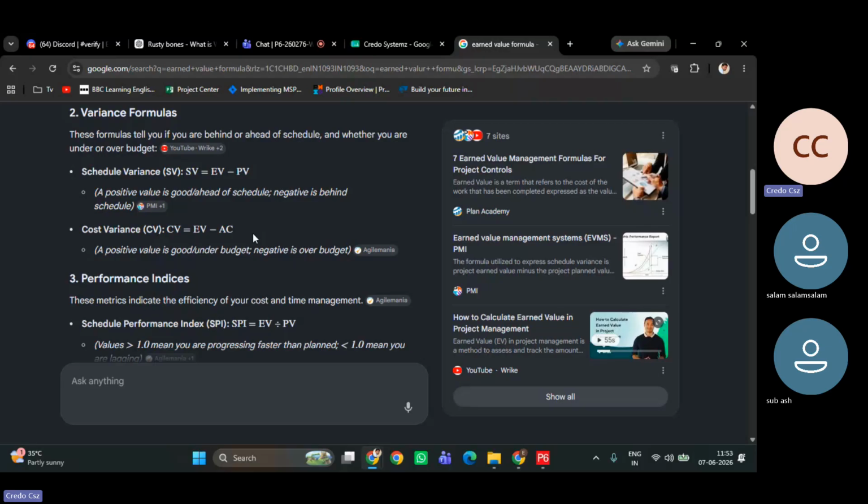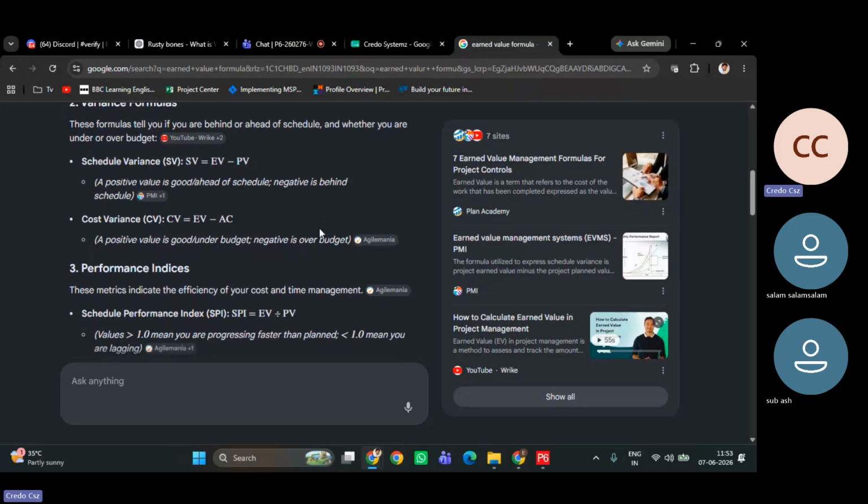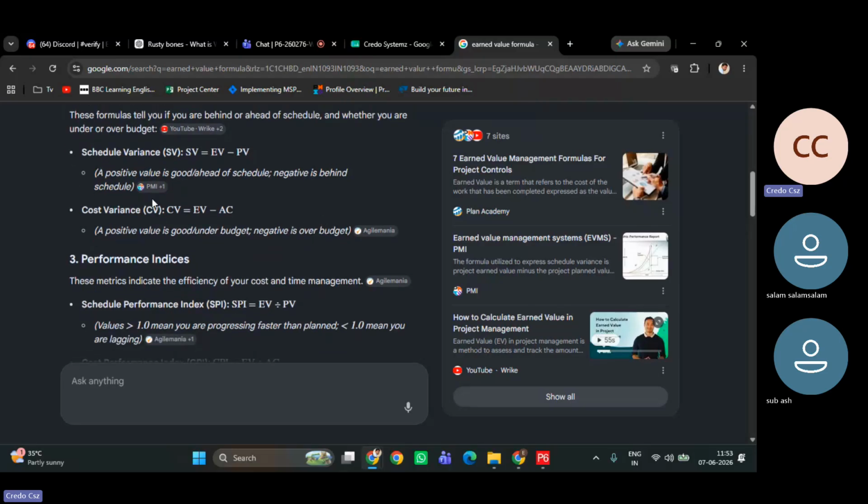In an EPC project contract, if the cost agreed for an activity is 100 rupees, whether we spend 110 or 90, we still say it's 100 rupees, right? That is why I explained that time: if you are a contractor, you will not use cost variance. Maybe schedule variance you can use, but cost variance you cannot. In your internal projects, if you are entering actuals, it will be useful.